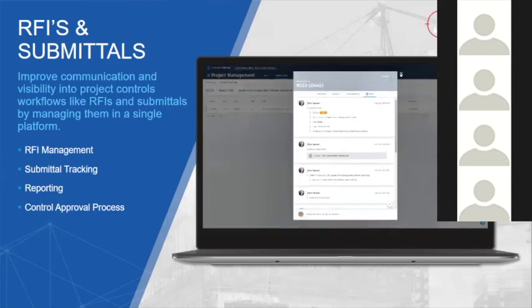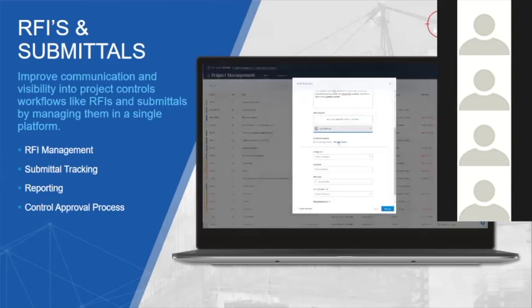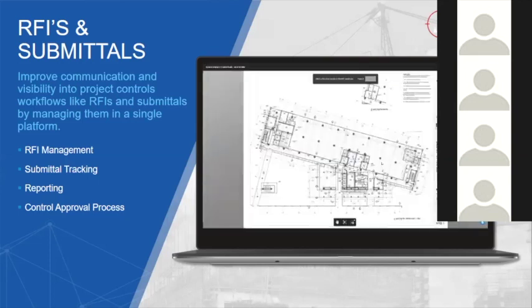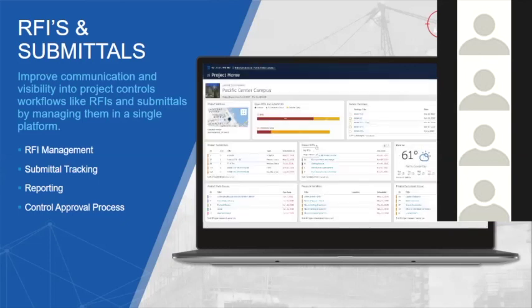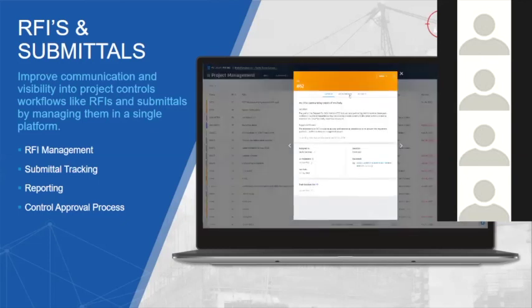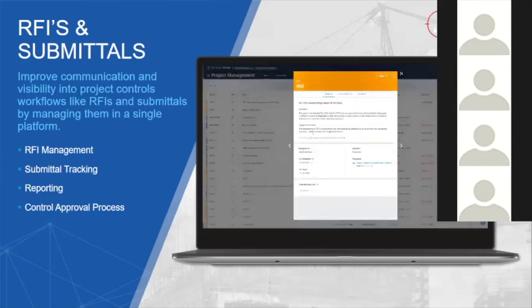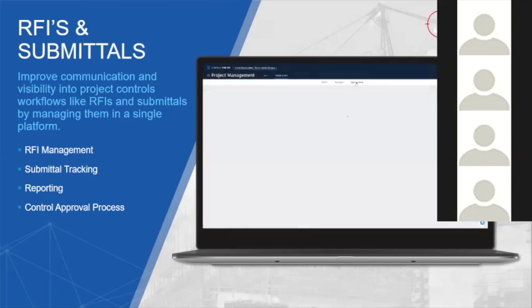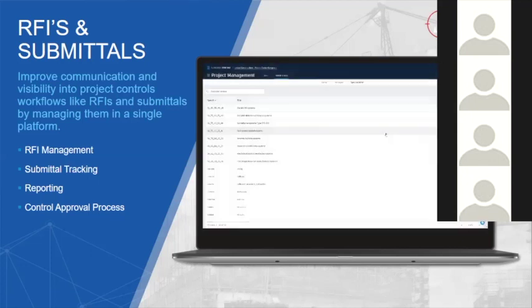And not only that, you can report things also. How am I reporting? Once everything is done, I can report that these things have been done, with such and such notice, or with these people's approvals, I have completed these things on such and such date. So like this, I can report also. Here you can see control approval, the same process I described. The first approves, and only after the first approves does it go to the second approval, then the third approval. So like this, we can create and control the approvals also.